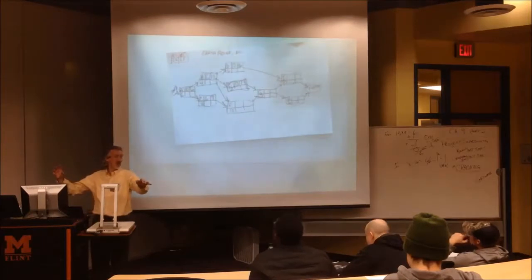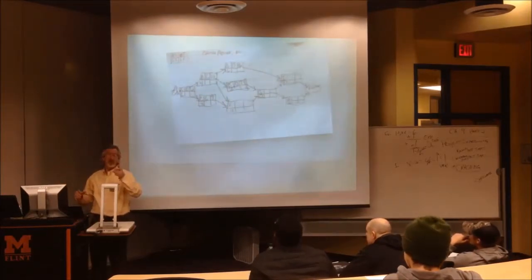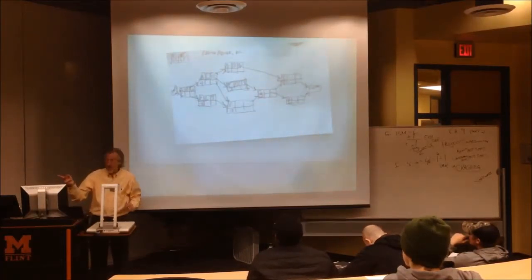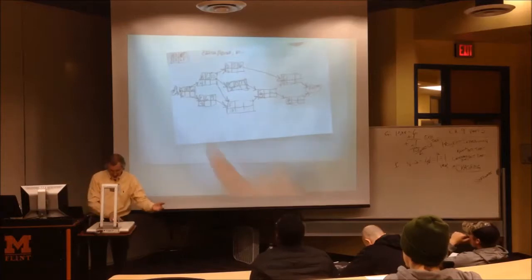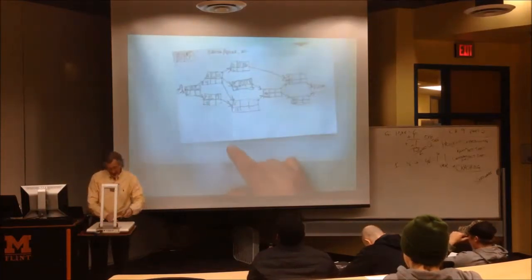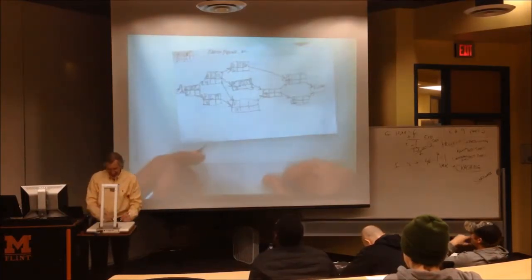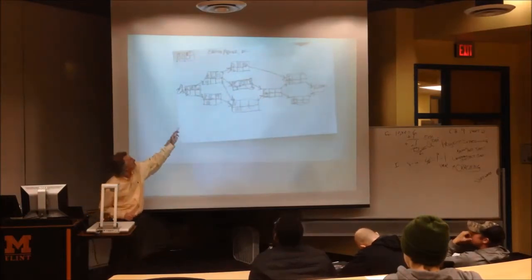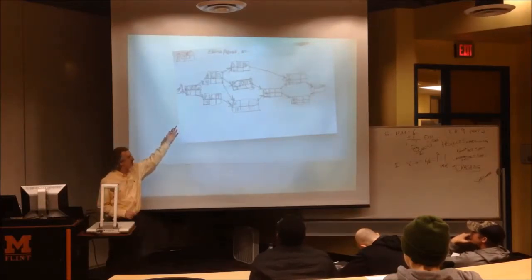Because it's the biggest number is the way I wanted you to remember it. If you can't remember the reason, both of these activities have to be finished before activity F starts. And even though one activity is finishing on unit of time 9, let's call it day 9, the other one's still going until day 10. So F cannot start till they're both finished, which is going to be the bigger amount of time, day 10.